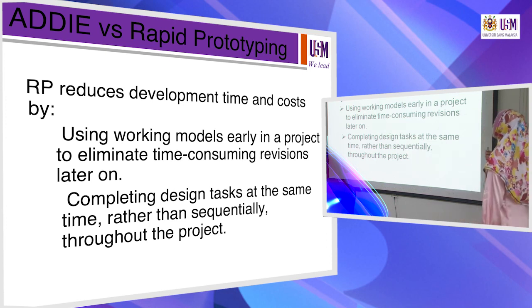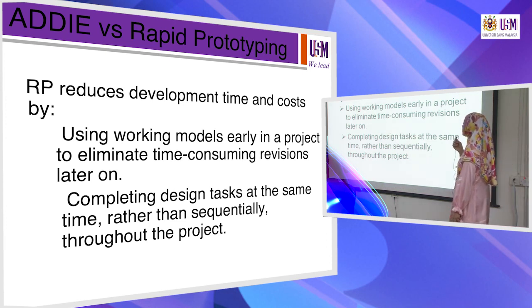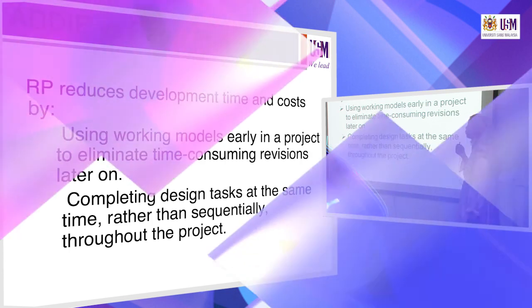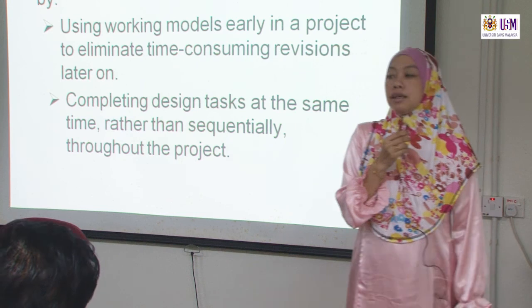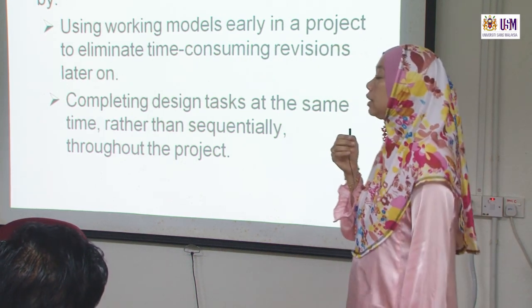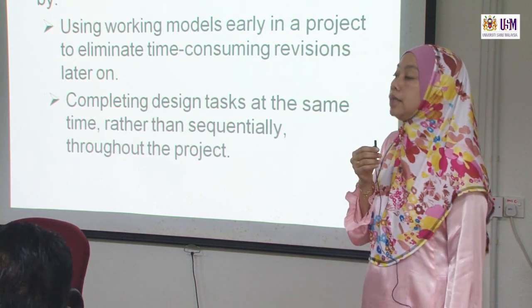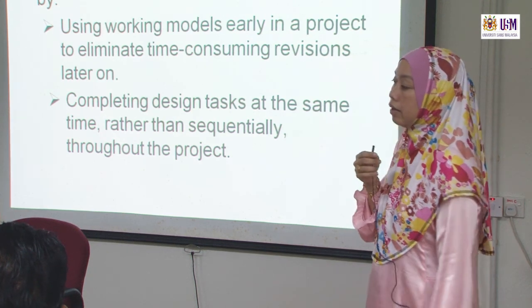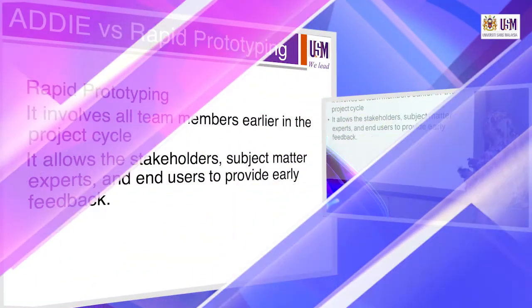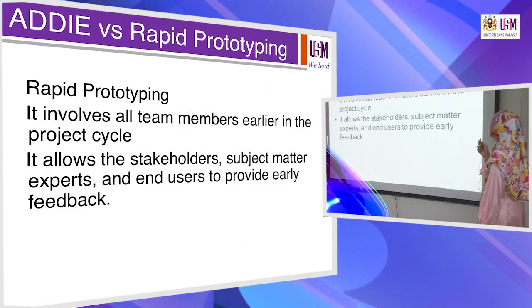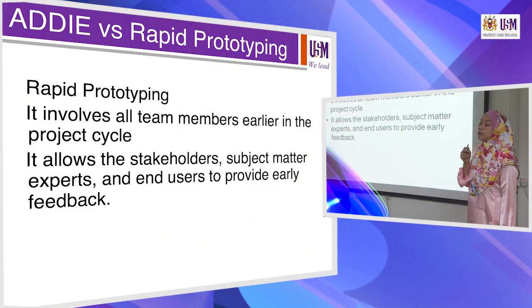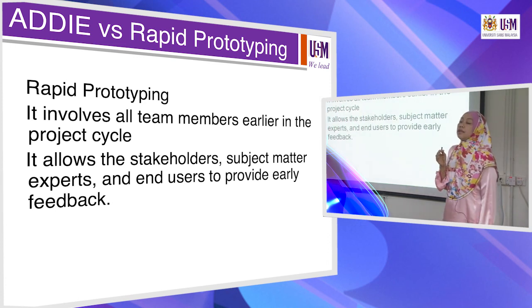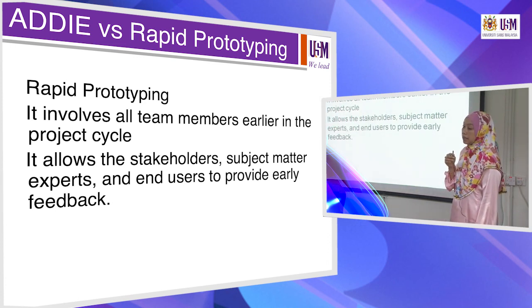And completing design tasks at the same time rather than sequentially throughout the project. If a task needs to be done quickly, then we do it quickly. We don't have to wait until the end of the process. And it involves all team members earlier. You must remember in rapid prototyping, everything is done earlier in the stage.